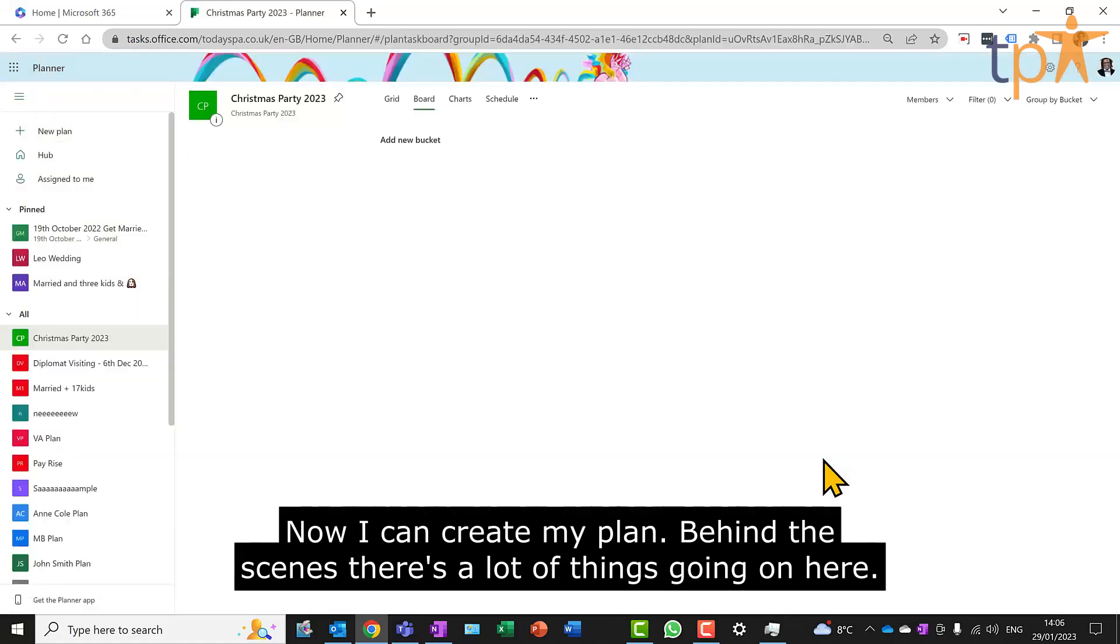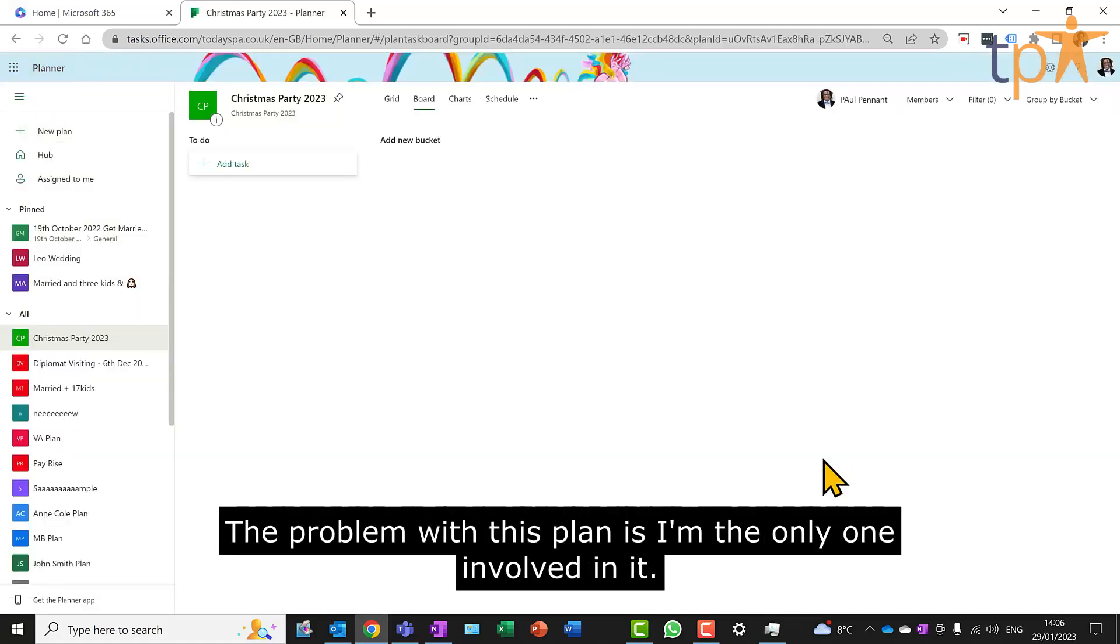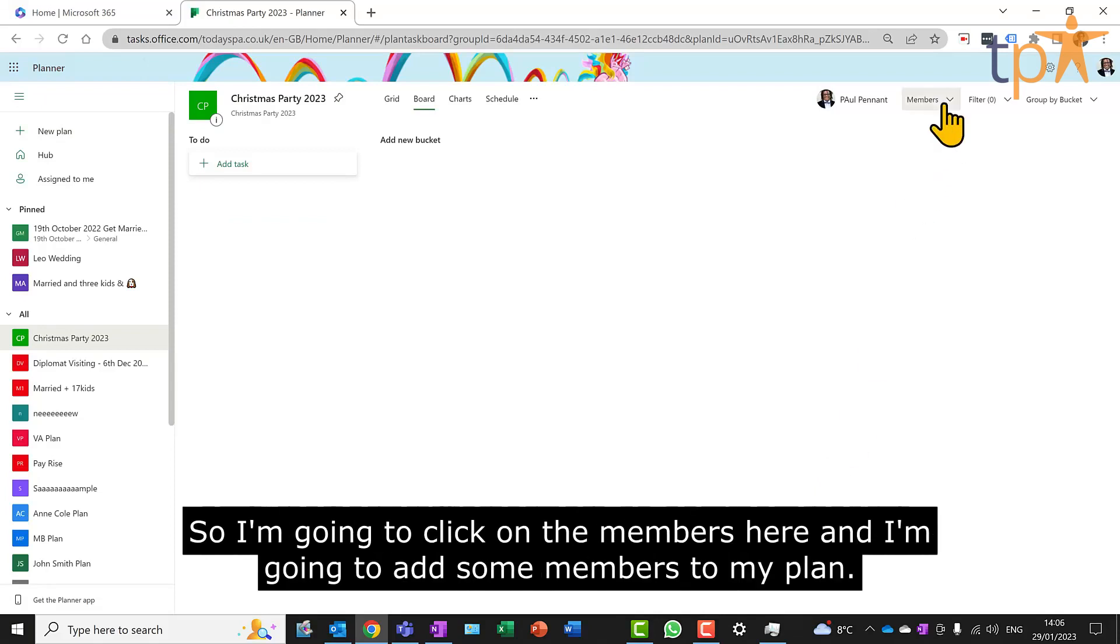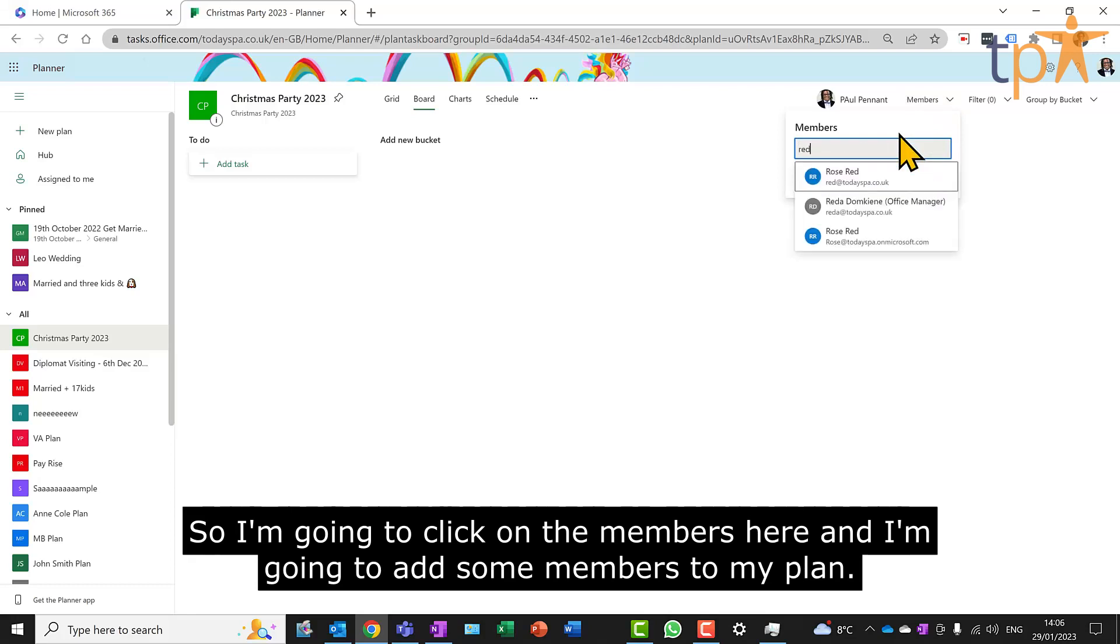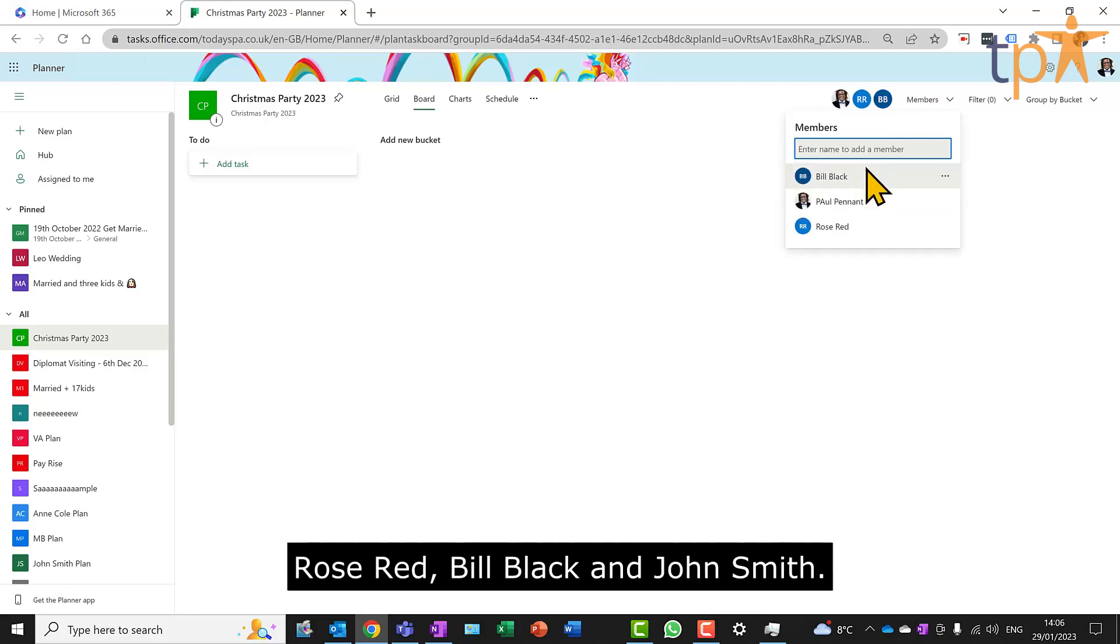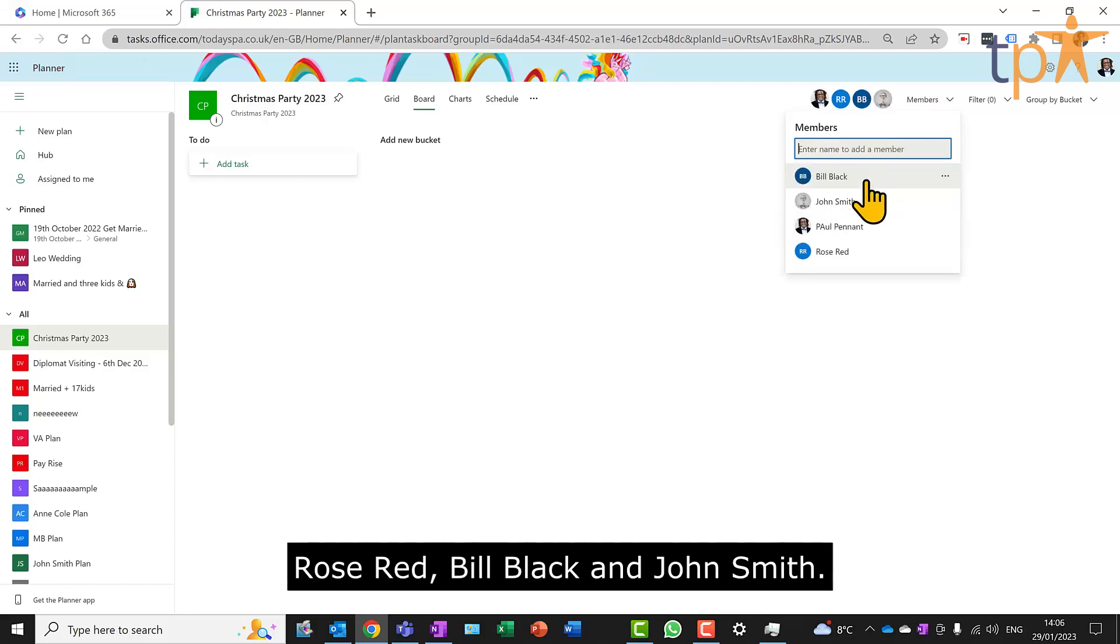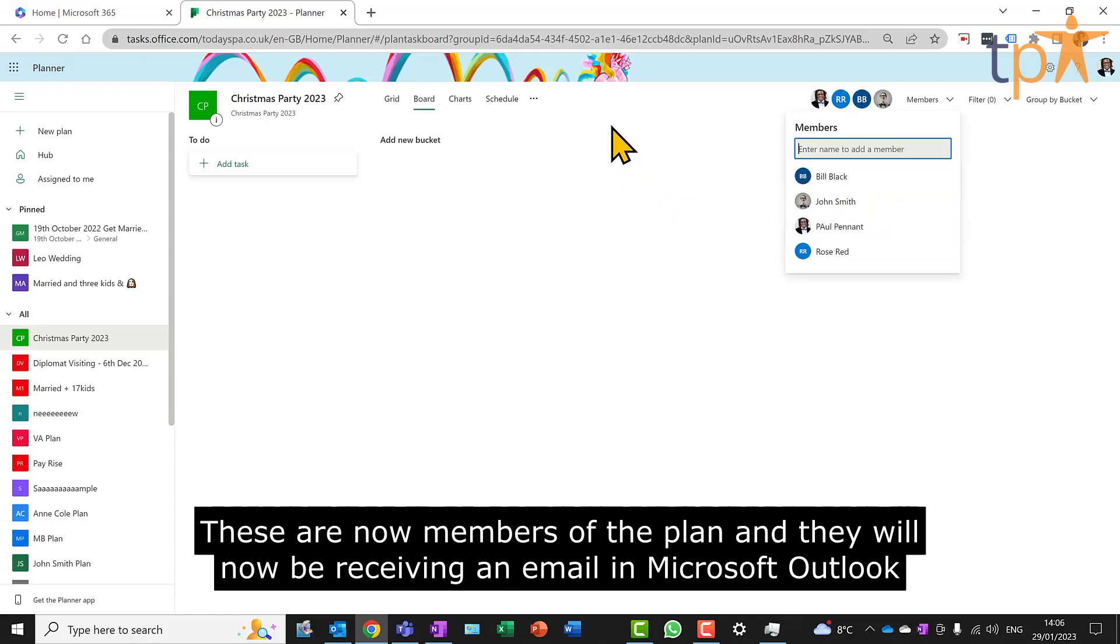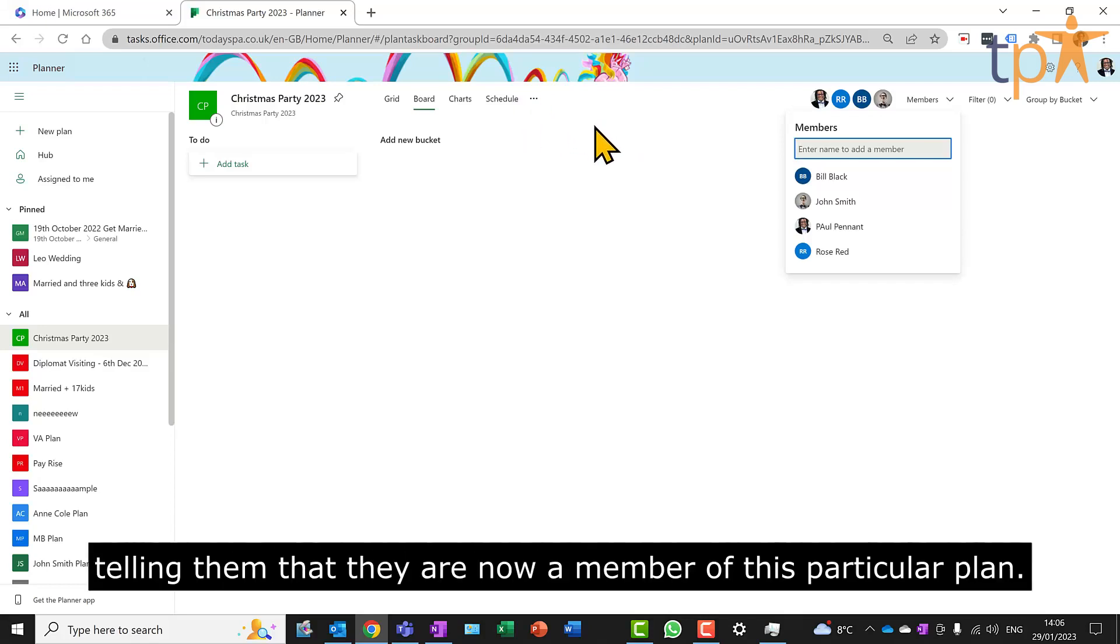Behind the scenes, there's a lot of things going on here. The problem with this plan is I'm the only one involved in it, so I'm going to click on the members here and I'm going to add some members to my plan: Rose Red, Bill Black, and John Smith. These are now members of the plan and they will now be receiving an email in Microsoft Outlook telling them that they are now a member of this particular plan.